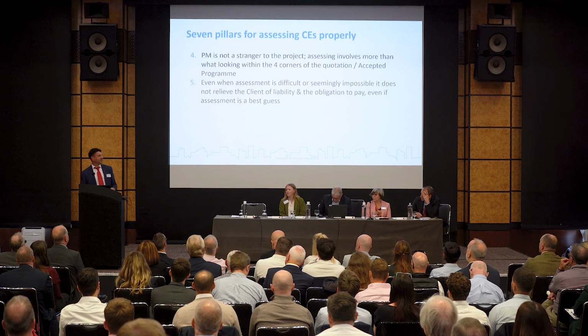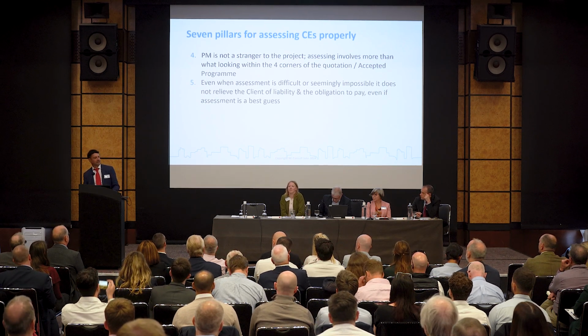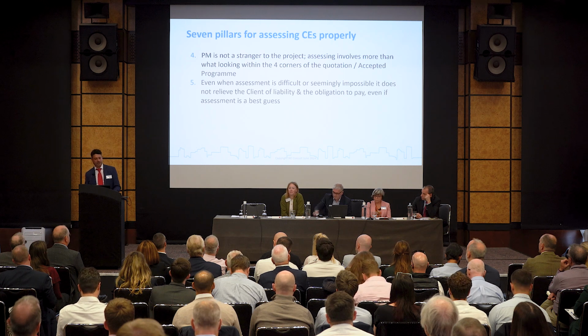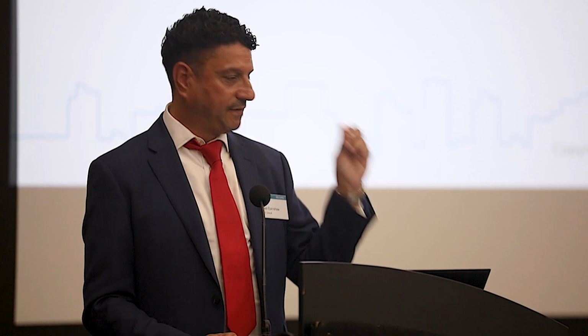Remember, even when assessment is difficult or seemingly impossible, it doesn't relieve the client of liability or an obligation to pay, even if the assessment is, at best, a guess. As long as you have made a genuine attempt to produce a fair and reasonable assessment, it doesn't matter if it's wrong. It's about having that legitimate attempt to do it. I did the best I could with the information that was available to me.